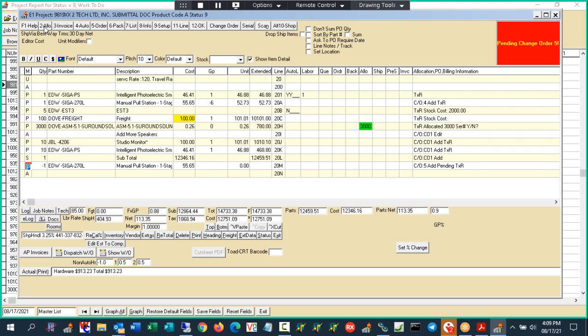So that's the point: you can't return it to the project until you put controls in place so that the person who has the approval sees a record of this item coming back to the project. When partial billing, that won't reallocate. I can't bill this line. I can't do anything with it, and I can't add lines to the project without creating the change order.